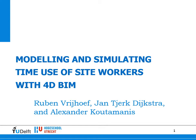So this is part of a bigger logistical ICT project we're doing, applied research in the Netherlands, trying to improve things like productivity on sites by logistical means. In previous phases of the research, we aimed at two-site logistics, which is getting materials to site just in time, pulled by subcontractors themselves, with nightly replenishment, so that materials are on site at the workplaces and workers of subcontractors don't need to carry them around and can start work directly. They also don't have to clean up the rubbish because it was cleaned up at night time, and from a consolidation center, so daily packages of work, totally programmed. We gained some 43% of productivity there.